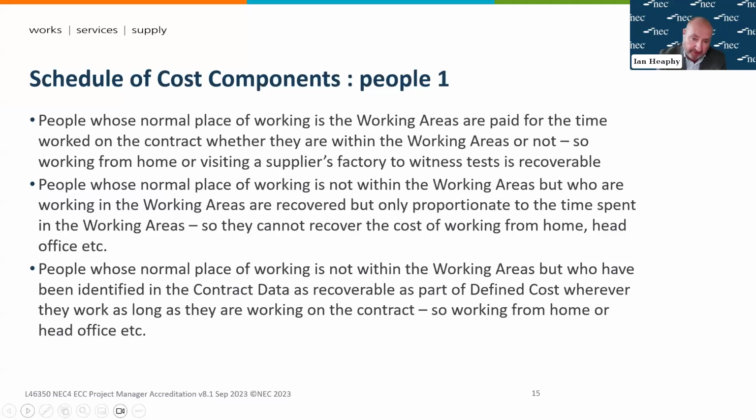We then have a category of people who are not based within the working area, so maybe based at a head office or a local office, but who are recoverable based on the time they spend within the working areas. So if they're working from home or remotely, they will not be recoverable as part of defined cost.